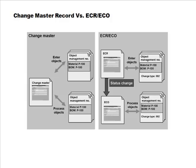The other approach is the engineering change request and engineering change order (ECR/ECO) approach. A student asked about multiple departments needing to review changes. The answer is: if you want a more complex formal process with multiple departments involved, you use the ECR/ECO. You first create an engineering change request - just like a purchase requisition - specifying the objects involved. Then it's formally approved, a change order is created, and based on the order you actually make changes to the various objects.